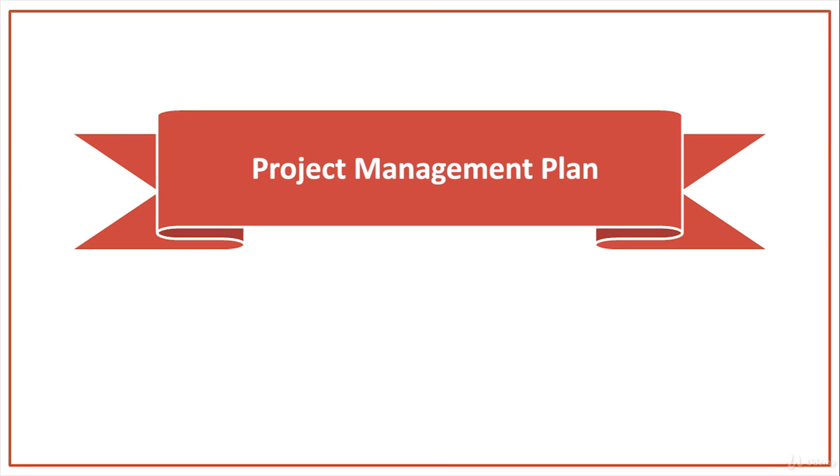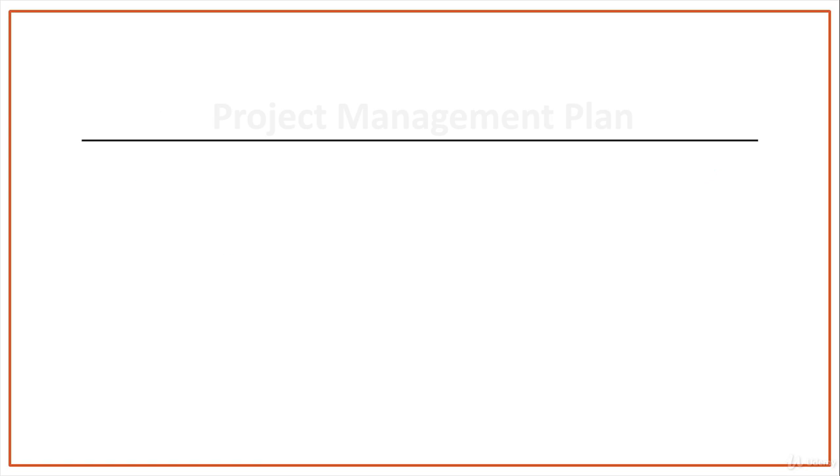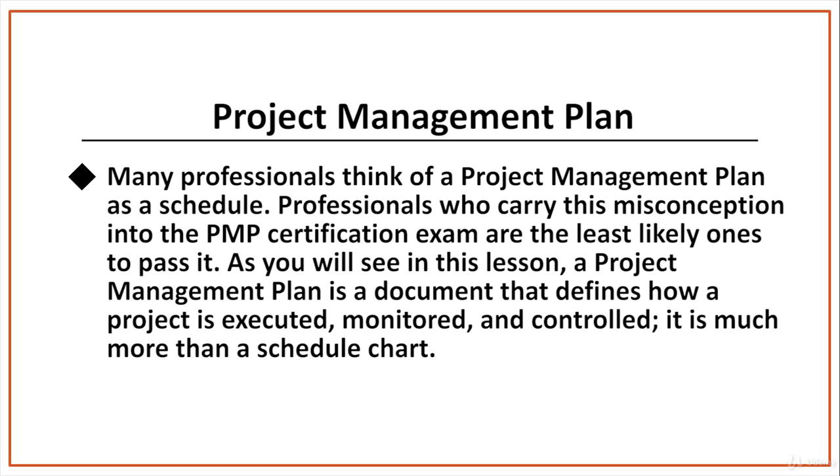Now we're going to talk about the project management plan. Many professionals think of a project management plan as a schedule. Professionals who carry this misconception into the PMP certification exam are the least likely ones to pass it. As you will see in this lesson, a project management plan is a document that defines how a project is executed, monitored, and controlled. It is much more than a schedule chart.